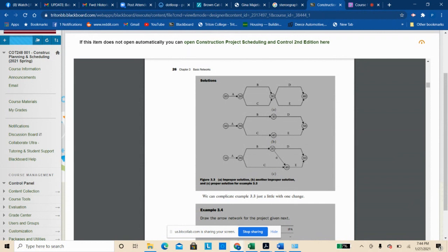And actually, the first 2 diagrams would be incorrect for the same reason the last one was incorrect. Because you can't differentiate between B and C in the top one, and then D and E. You have all the same nodes again, and your paths. You might show different labels on your paths, like A, B, A, C.